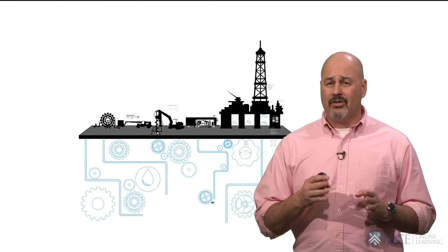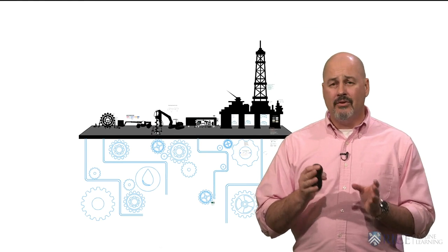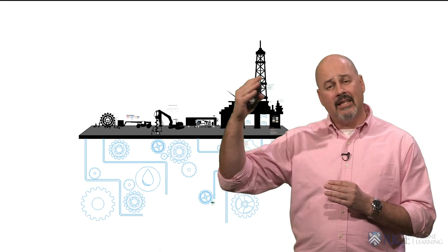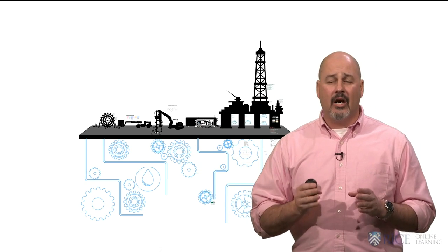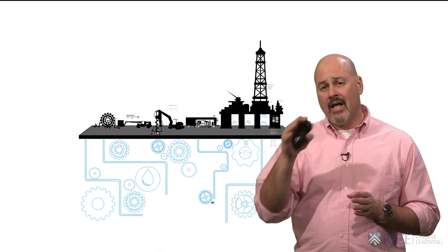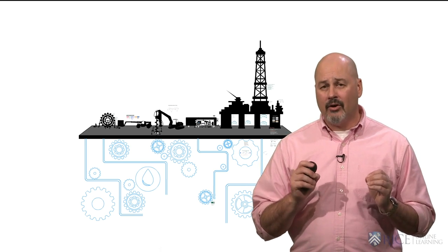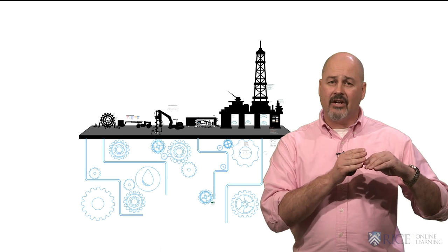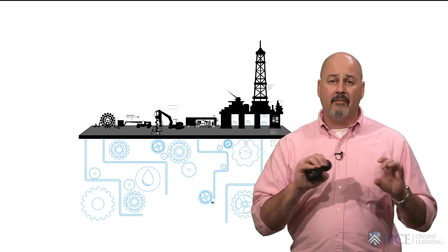So now we've discussed total slack. And what does that actually mean? It means the amount of time that you can delay a particular activity in your project without delaying the end time or end date of your project. And it varies. Keeping in mind that the total slack in the critical path is 0. Anything that deviates from that critical path will delay your project. But the activities that are not in the critical path, you can delay based on the amount of slack time.